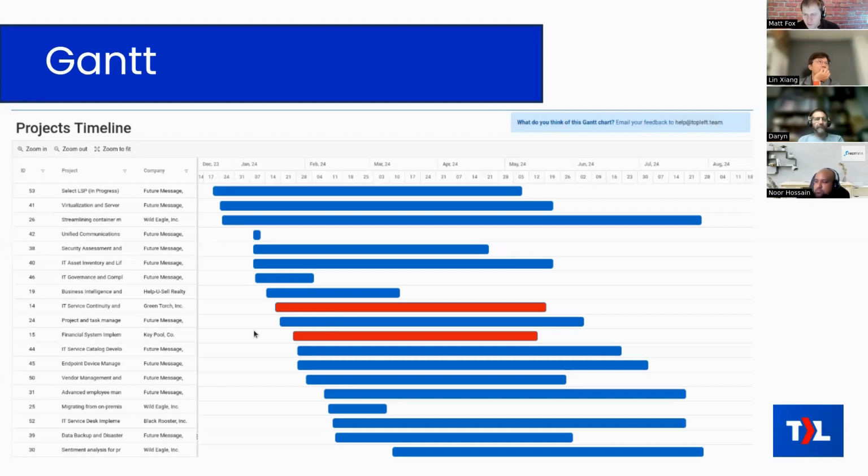Yes. Now I didn't catch, are you asking that in reference to the Gantt chart or the Kanban boards? To that Gantt chart. I'm just thinking overall when we're looking at the department's health, it can be a way of identifying exceptions. Yes. So you were referring to the budget hours, and actually that is reflected here. Like in this example, the red ones here are something where they've already had more than 100% of their budget used. I don't think there's an example on this image, but there would be an indication here on one that hasn't yet reached its budget. The part of the bar would be one color to reflect how much of the budget has been used.